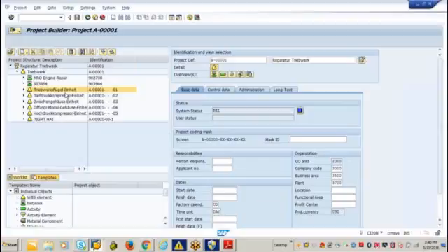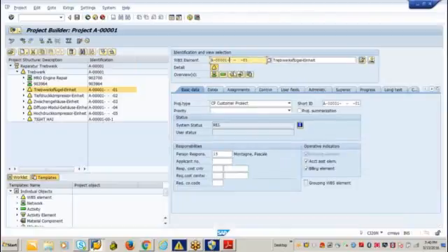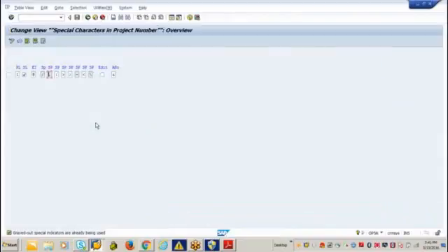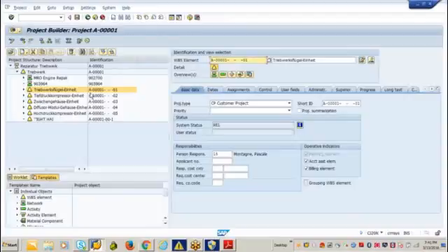And then you can see other separators as well. If I click on WBS, you can see it has the same hyphen as well. As part of my coding mask, I can use any of these special characters as separators. So instead of this level, A3401 hyphen, instead of the hyphen I can use a dot to indicate what the next level WBS is.